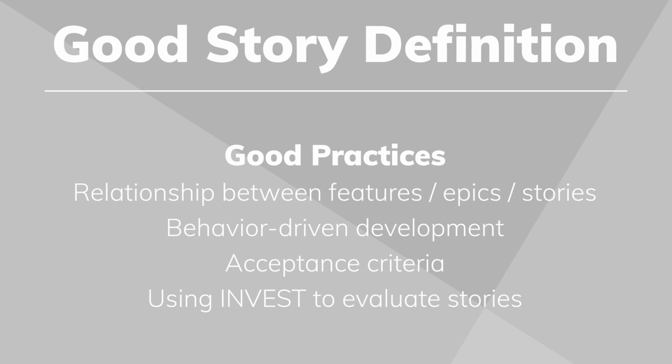Acceptance criteria are probably, to me, the most critical good practice. If you want to know what you're testing, you want the team to agree on what's being implemented, and you want your users to be happy. And then INVEST is one of the ways of evaluating stories. Anytime you go into a grooming session, it's really helpful to have a checklist, which helps you build the acceptance criteria. It helps you make sure that the story is well defined. And that way you don't kind of get too involved in the conversation and you're able to go, yes, but has it met these things? And INVEST is one of those checklists. So what we're after with that good story definition is clarity. We understand what it is. We know how we're going to go forward.